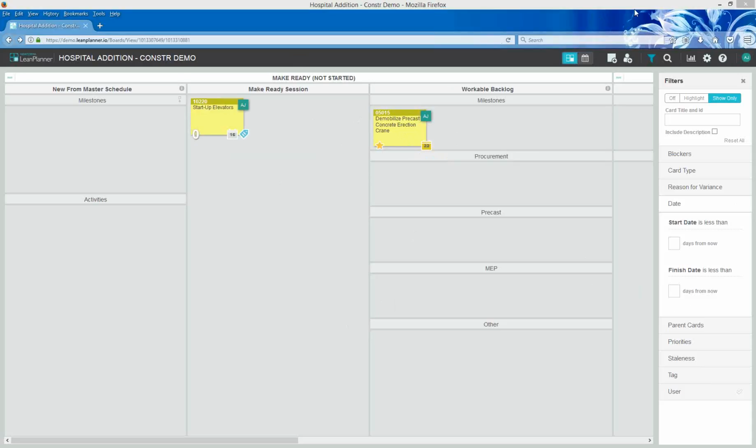I could take a look, or I'd get notified that Naresh finished that ahead of time. That gives me an opportunity to start my dependent work ahead of time. So there's even an opportunity to get ahead of schedule instead of just preventing getting behind schedule, and that's where efficiency could really tick up a notch. So that's what I'm hoping to do.